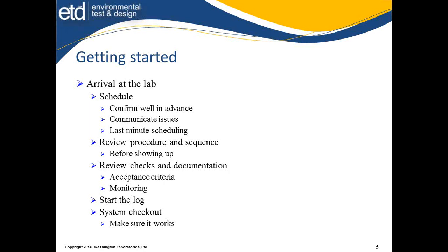Now I'm going to plead guilty to a lot of the problems. These test procedures show up with the test, and we seldom get the opportunity because of busy schedules to spend a lot of time with it prior to it coming into play. We usually, and all of the test people here particularly, try to look at this way ahead of time. And lo and behold, when it shows up, well, revision 3 is now in play instead of Rev 0, because the one we received was when the quote request came out, and it's been upgraded 3 times since. So now there are differences that we didn't know about. You need to verify this right off the bat. Verify that what you have for procedure matches what the customer expects.